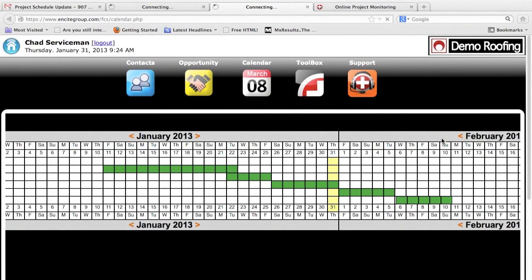There's one thing inside the OPM that I didn't dive into, which was labor reported. So not only will you guys be able to see that you're 75% done inside your square foot, but you'll also know that you're 85% of what your estimated labor hours are. Now that ties in very closely with the estimate program. It will also allow you guys to be able to understand both sides.